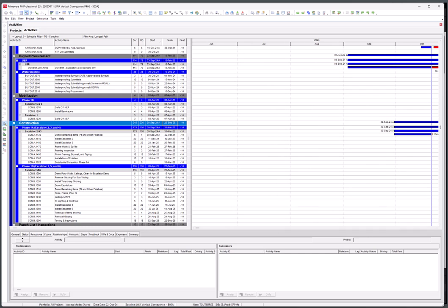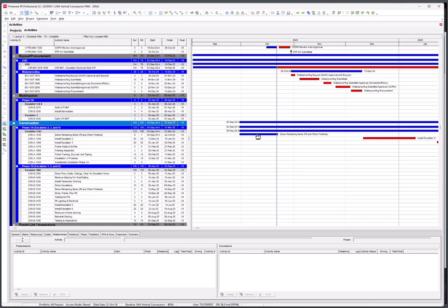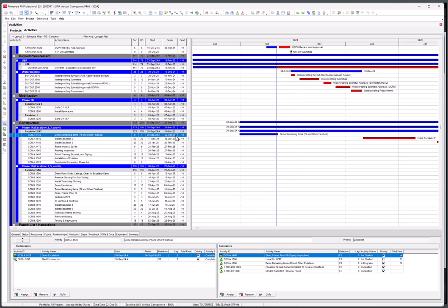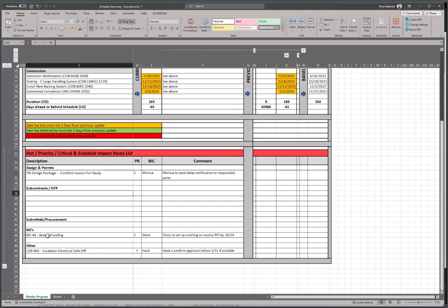And the reason why I knew it had red is if I click it, I can see that it's not actualized, it's not done. So if it's not done, it's not all blue, right? So there's still a little bit of remaining pending items in the pit and other finishes to demo, right? So our demo guy needs to hurry up so that we keep him off the critical path, right? Or better that date.